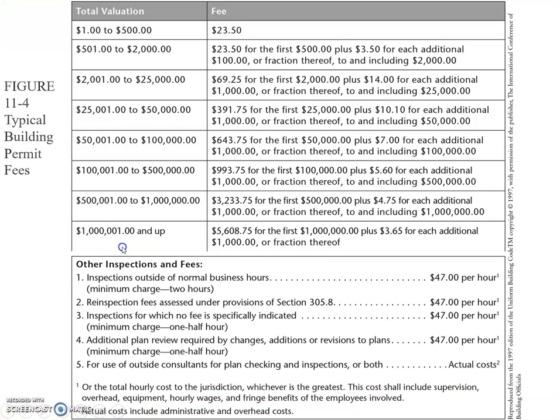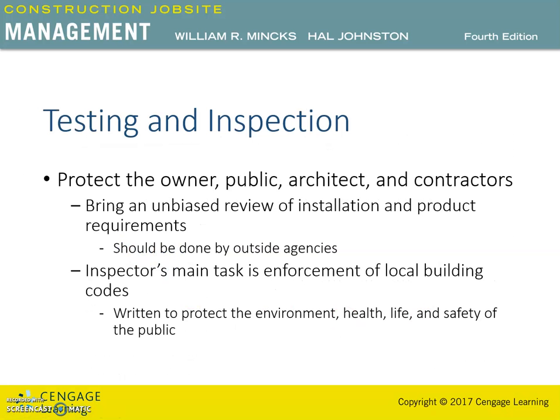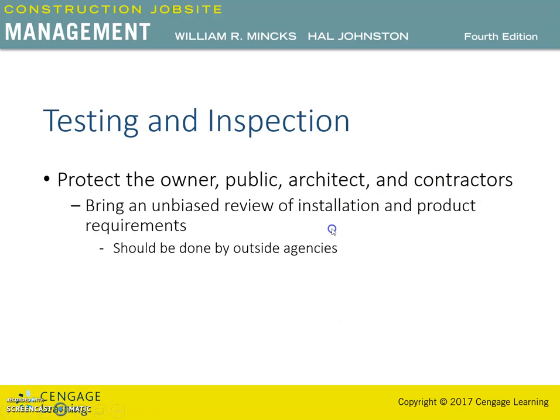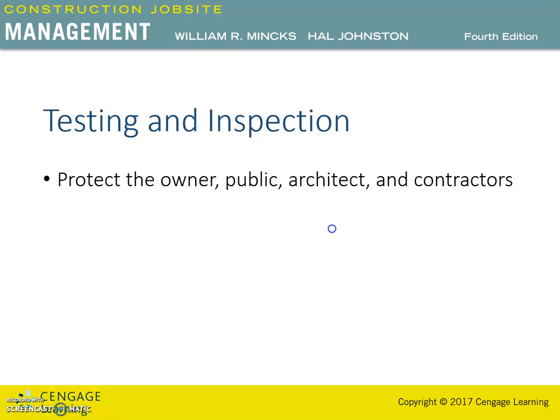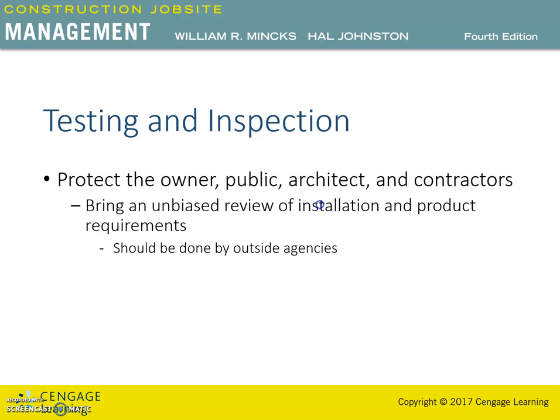So the testing and inspection is required on the site. Both testing and inspection are required by most contractors to protect the owner, public, architect, and contractors. So the inspection process should be done by independent agencies outside of the contract process to avoid any